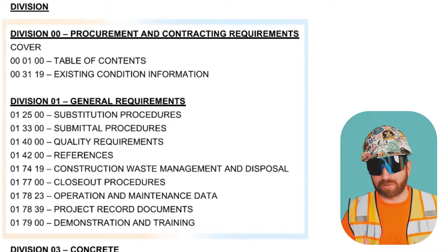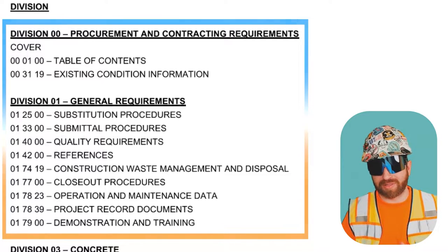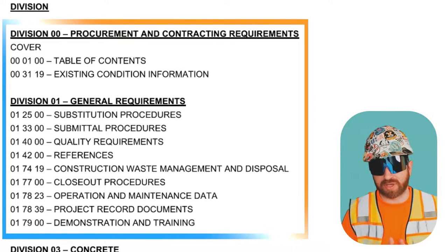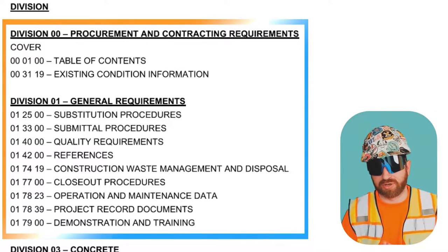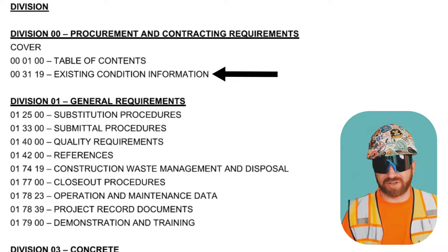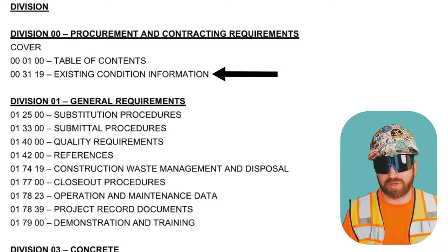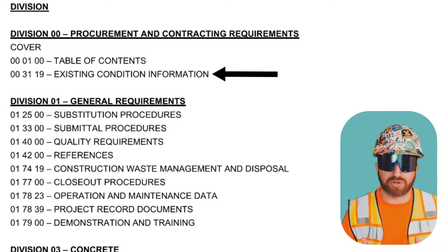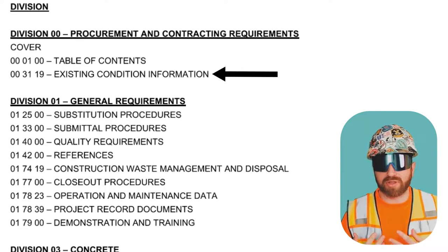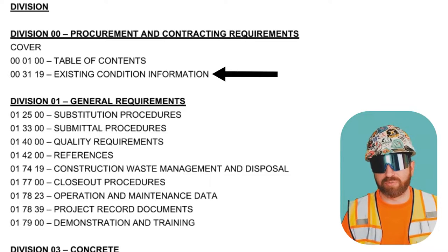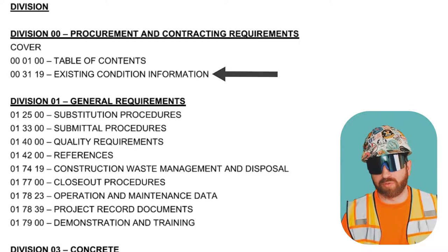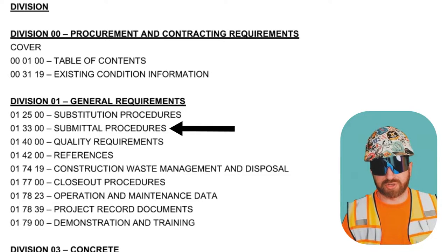I'm going to briefly cover the general requirement items, and then I'm going to jump into a specific specification section. Existing condition information could range from site surveys — which are usually external reference documents showing where past buildings and underground structures may exist — to geotechnical reports, which would tell you the composition of your building soils before you get started. Submittal procedures.